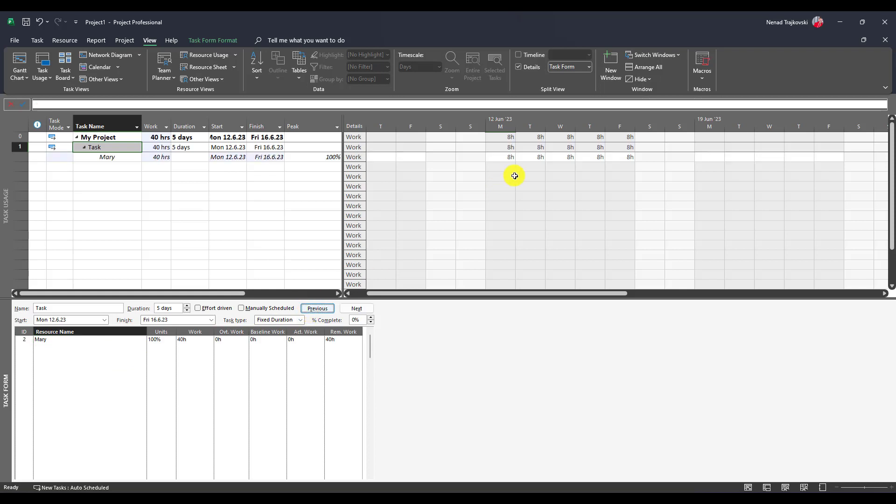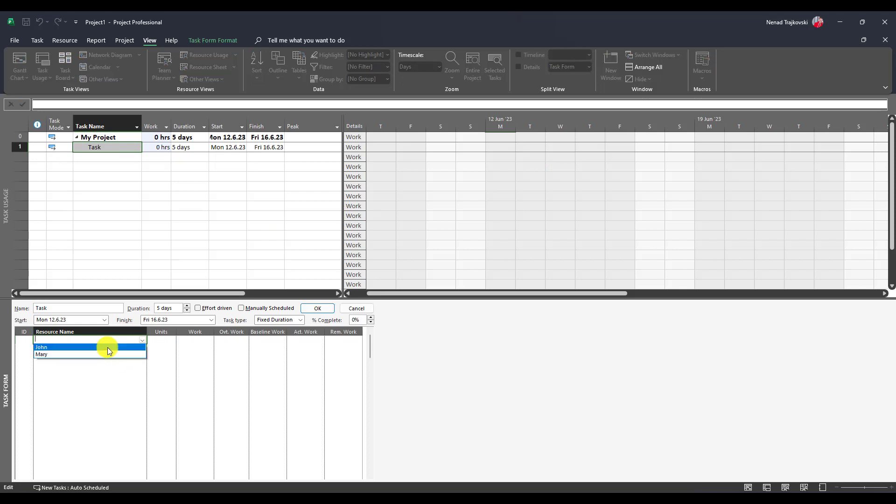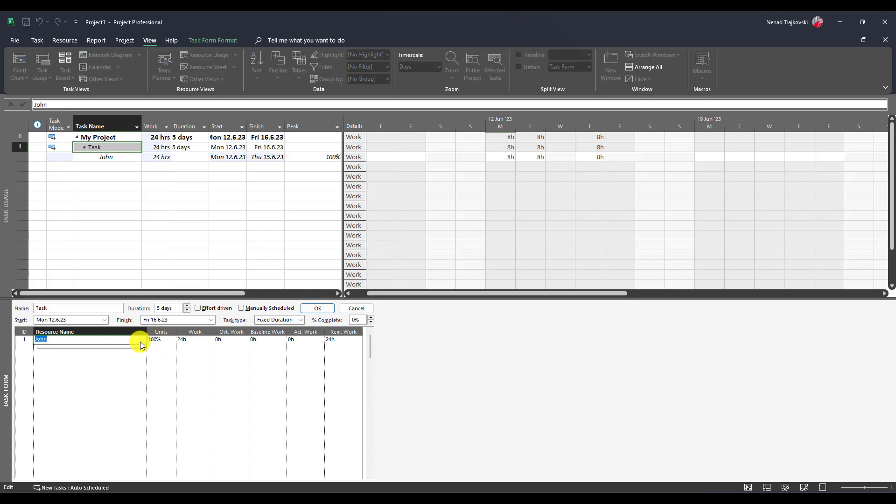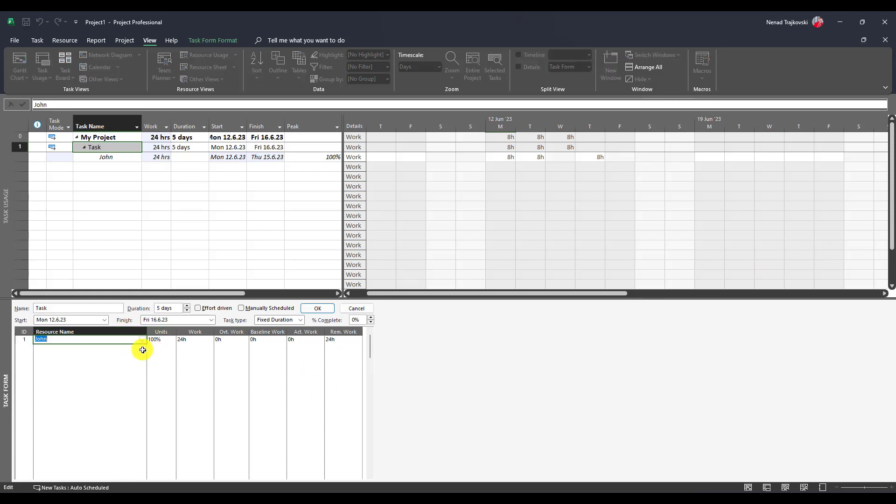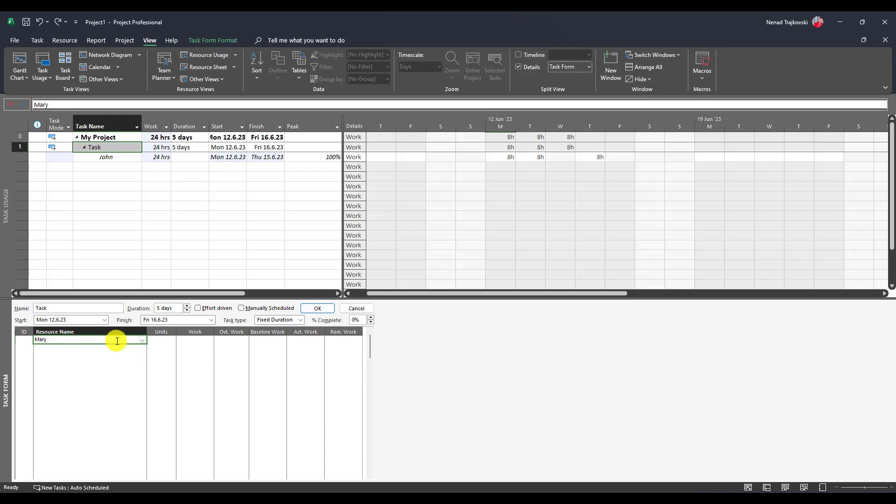I will get what I want. If I don't do that, if I add first John and then replace with Mary, I will get her to work 24 hours in five days, which is not what is expected. So once again, what you can do is you can add Mary and erase John.